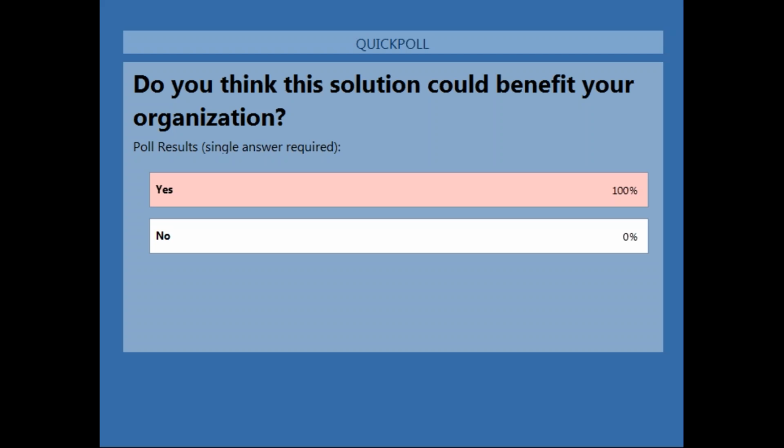And so Sarah, for whoever asked that question, or for anyone, of course, as we speak to you coming up, it's something that I think we can help you get to a timeline fairly quickly, but it's not something that's a standard answer, right? Just because of the many levers that can be pulled. One of the biggest factors is availability of the client's resources. If they want it to be brought up very quickly, within, say, 10 to 12 weeks, then we just need a dedicated resource. Often our time frame is whatever the client needs, but it has to do with how available their resources are to work with us.